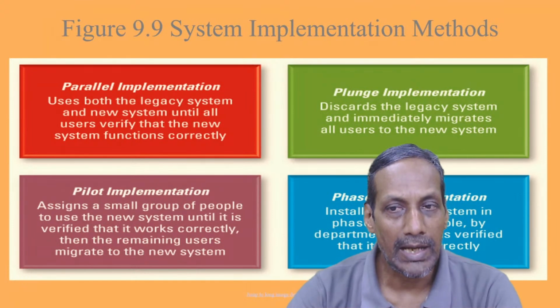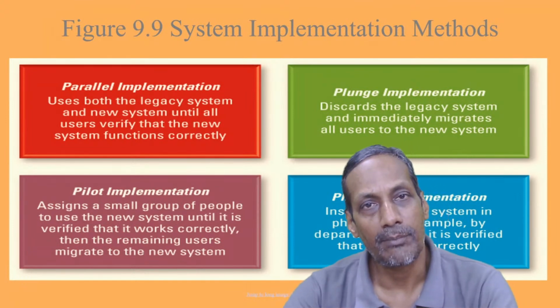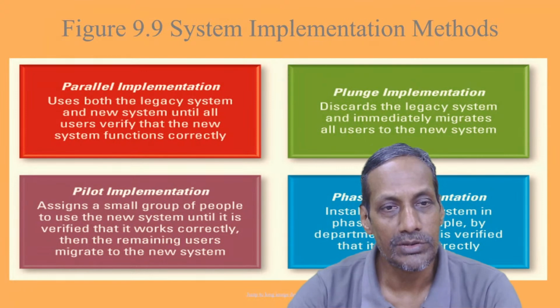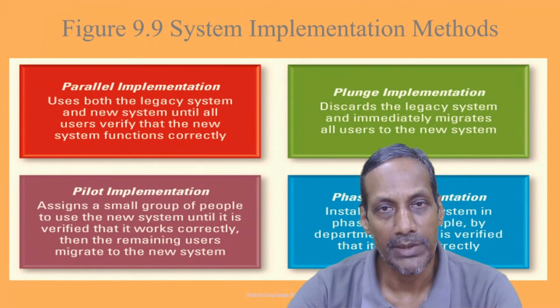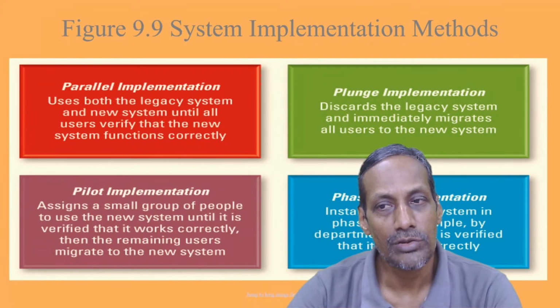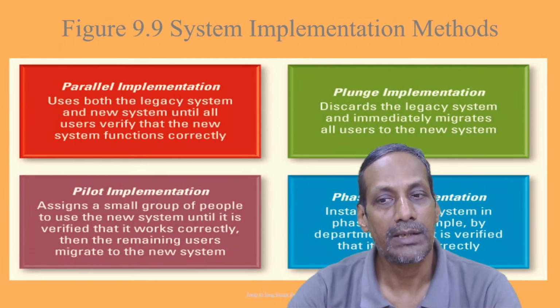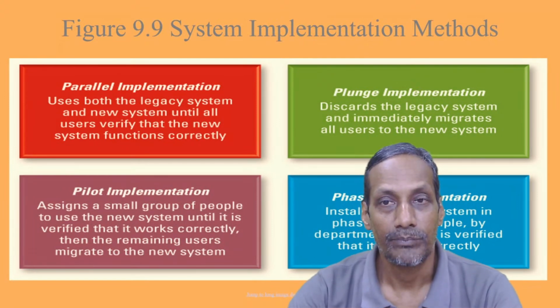If you have all the time under the sun to design your new system, you can go for this phased implementation. That means you install the new system in phases, for example, by department, until it is verified that it works correctly.